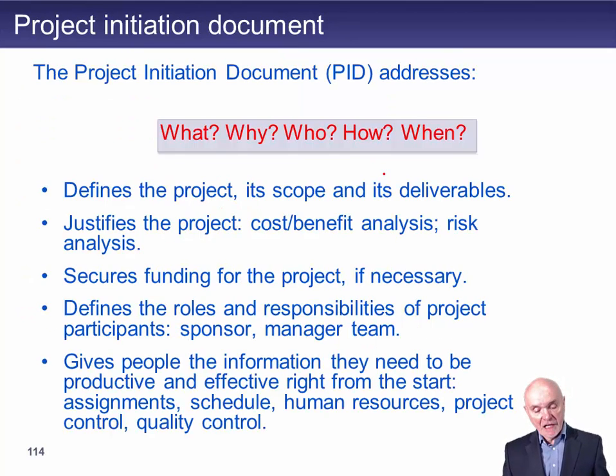The project initiation document is important. It suffers from its name, I think. People see the word initiation and they think it's only used at the start of the project. But really you need to think of the project initiation document as the key reference document and almost handbook of the project. Anything you need to find out about the project should be written in this document. So I'll answer the big questions here.